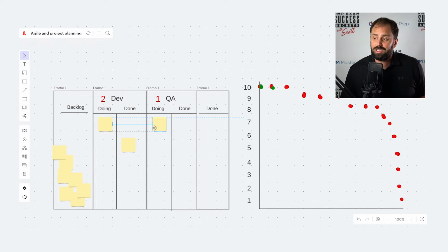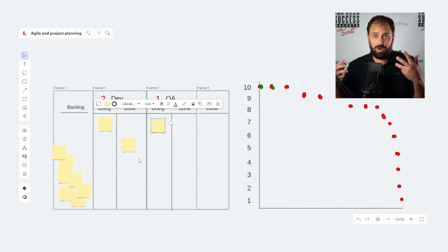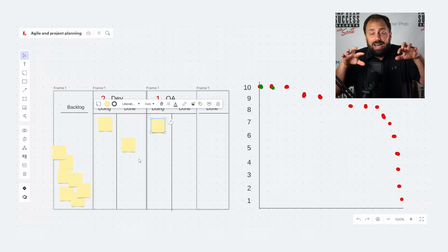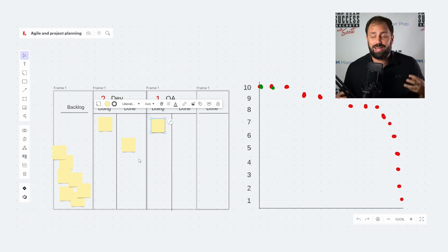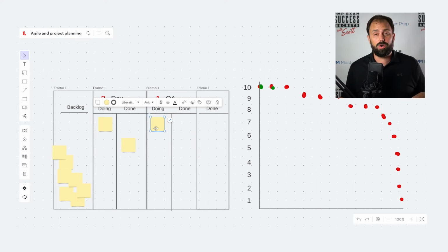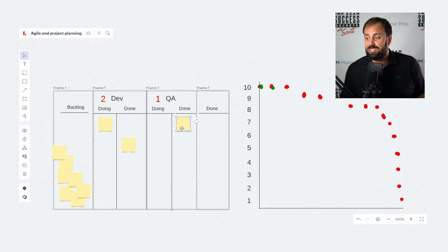Or since he just built this, he could say, QA dude, while you have little bugs and things, I'm here. I've got fingers. I've got eyes. I'll fix it. Because the code and the work is so fresh in his mind, he gets it through. So he could be there and help. Boom, they work through it. Instead of the work piling up, they get it done on day 2. Boom, it moves to done.